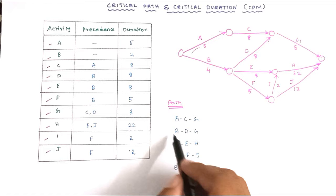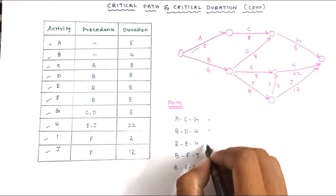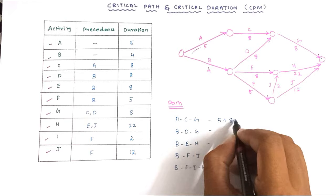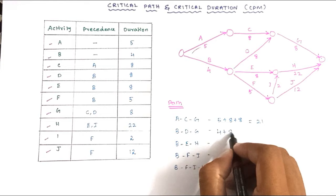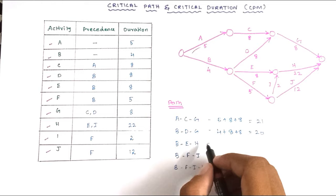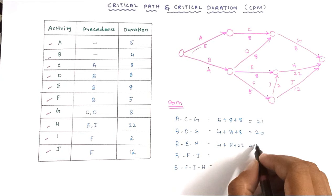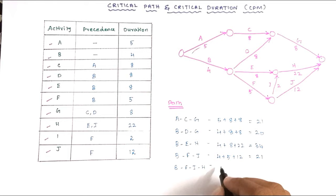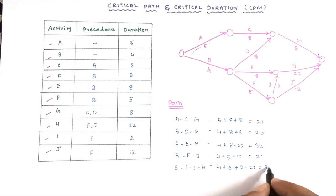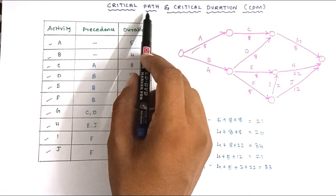Now we calculate the corresponding durations. Path A–C–G: 5 + 8 + 8 = 21. Path B–D–G: 4 + 8 + 8 = 20. Path B–F–J: 4 + 5 + 12 = 21. Path B–F–I–H: 4 + 5 + 2 + 22 = 33. The critical path is the path with the longest duration, as we defined earlier.